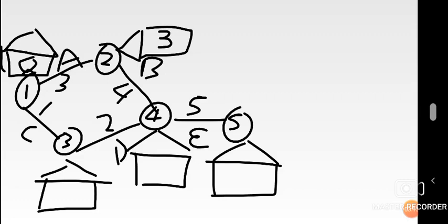Okay, so on node 2, what about node 3? How do you get to node 3? There's that movement from point 1 to point 3. There's a duration of 1. So meaning the earliest you can start there is actually just 1.